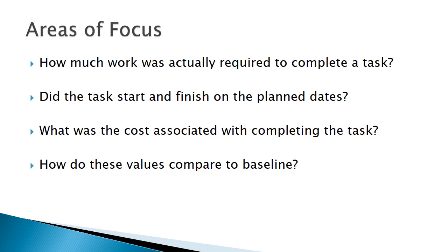Once the baseline has been set and the work of the project has started, you will need to regularly collect, update, and analyze project performance details with a focus on three specific areas. How much work was actually required to complete a task? Did the task start and finish on the planned dates? What was the cost associated with completing the task? This information needs to be compared to the project baseline, and the results need to be communicated to the stakeholders.